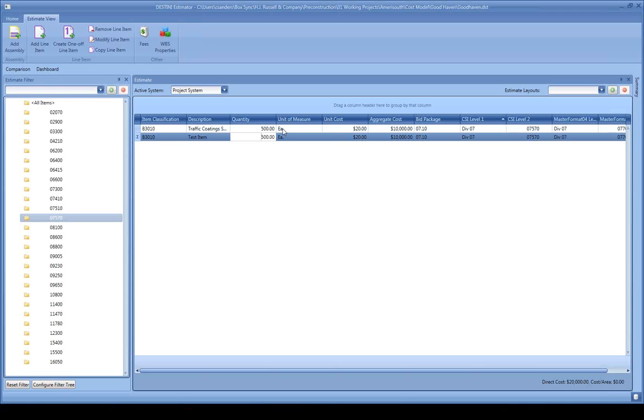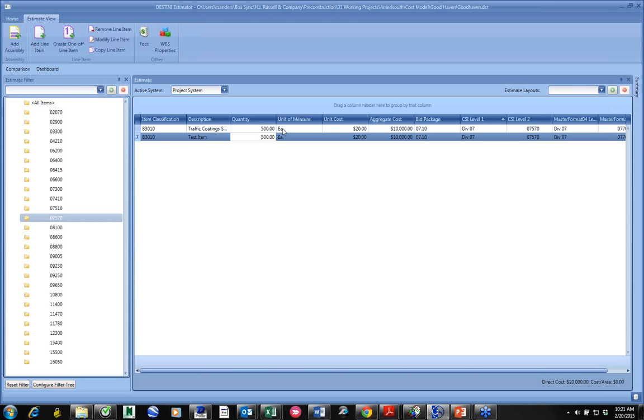I know that's a feature that I will use in the future, because especially for this project, as you move forward, you will inevitably have to do variance reports based on that last budget that you did. It's going to come up, why these prices are changing, even if they go down. Whether they go up or go down, you still want to know exactly where it is in that budget. Estimator will allow you to do that type of variance reporting.